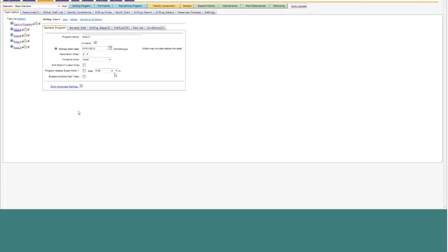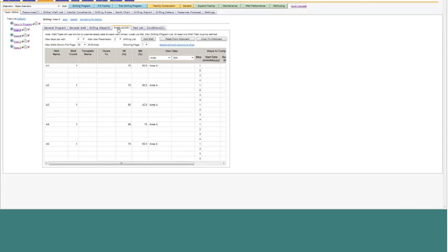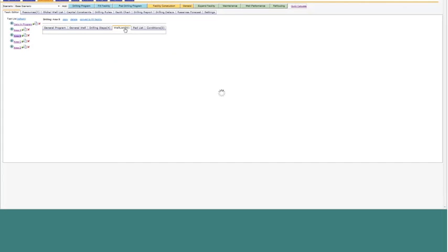Now what's happening with these 4 programs is that they're coming in as one big program. I'm getting my list as one big program, and the list is saying, hey, these are area A wells, these are area B wells, these are area C, and these are area D. And what I'm having to do is, in Excel, filter these out and break these out into different pieces, and then paste 4 different times. I break out my area A wells and paste all of these into area A, and then I go and break out my area B wells and do the same thing, and then do the same thing with area C and area D.